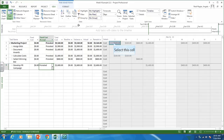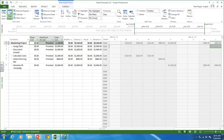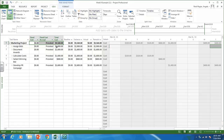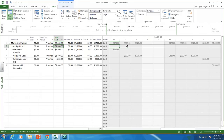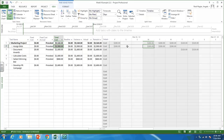This is our time phase budget. It shows the parent activity so we can see the project as a whole — what we're spending each day — and underneath it shows what each day costs for each individual task. Over here we have our total costs. The marketing project total is $9,560. Assign Bids costs $2,900, and that $2,900 is spread across Monday, Tuesday, and Wednesday. There's your time phase budget for this exercise.